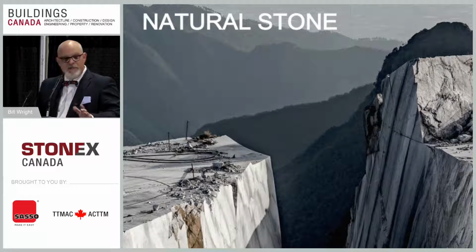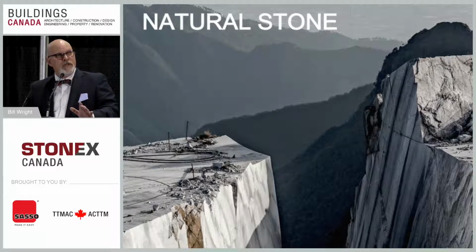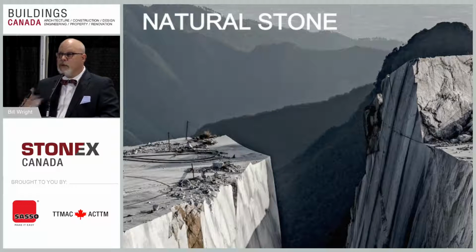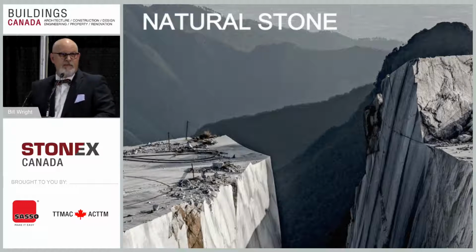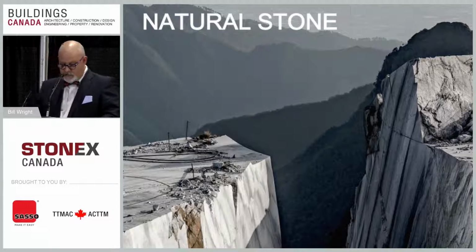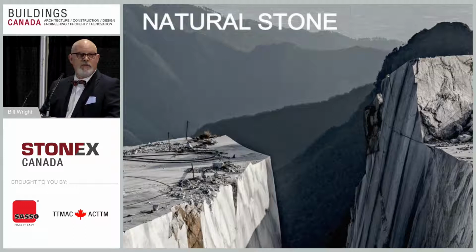It wasn't a complete failure. It was just a little bit of a delay to get things done. But if there'd been a little better communication in terms of sampling, I'm a big fan now of making sure that everybody gets a copy of a sample: us as a supplier, the specifier, the installer, so that everybody's got the same sample. We know what to get. There aren't any surprises. Okay. I generally like to have everything signed and approved, so there's no surprises after the fact.